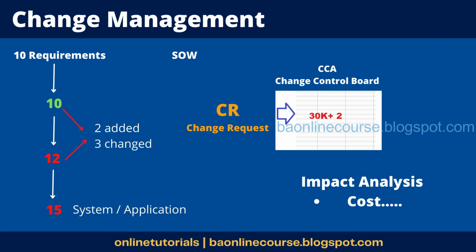So you are only saying that, I have analyzed this change request that came from this SME. I have analyzed this. Now you tell me whether I should take it up or not. Okay. So only after he approves, that is when the change is implemented. Right? So here we would only tell the dependencies which are going to be impacted due to that change. Only that information would be going, right? Not just that, you would also tell what is the effort it would take, what is the timelines it would take,